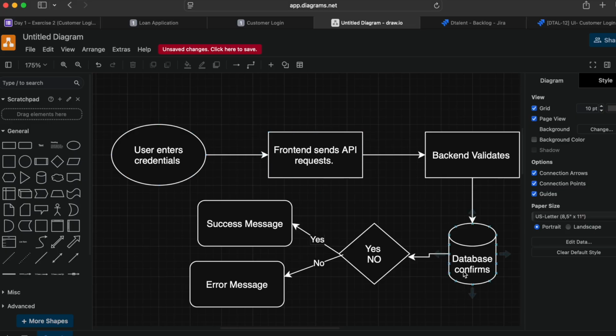And we assume the API is there and it's storing the data values and retrieving the information and coming back with the result, right? So these two are dependencies for us. Maybe here 5, here maybe 3, and altogether for this work maybe 10, or maybe it's a large user story, 13. We can break it into 3 stories, but in our case we are only focusing on this one. So maybe we can go with either 5, because we need to build the form and validate everything, or 8. So we'll go with the highest story point here.